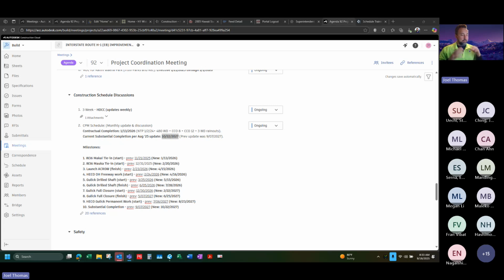Going back, that's the whole point of the notification. That's why we need the notification from the contractor. We need them to tell us what's going on, why there's a delay, and where it is, because it gives us a chance to actually mitigate and manage it, rather than getting hit with claims later and going, wait, what? You were delayed? We want to be an active part of the solution.